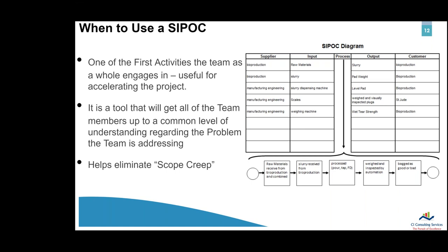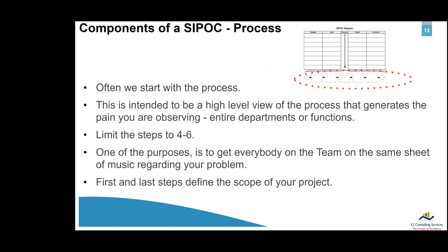Also, keep in mind that the first and last process boxes are what define the scope of your project. So this is a very practical tool to help eliminate scope creep. And I think that's really important.